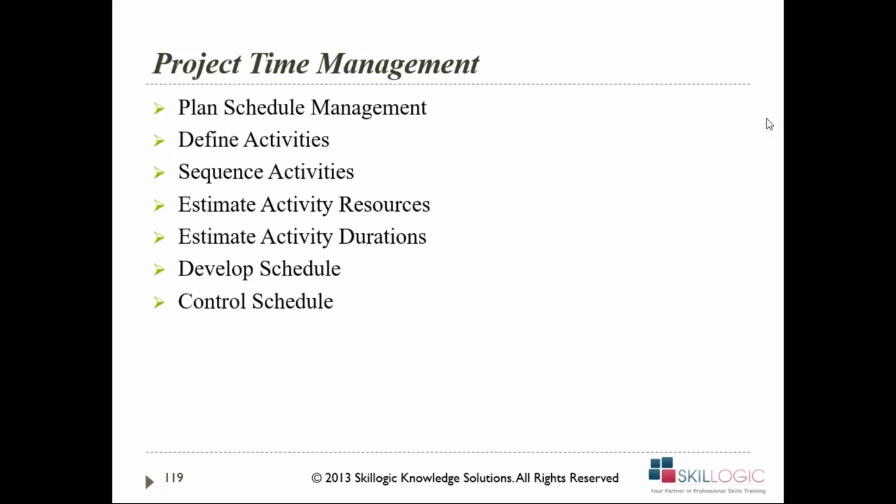Now, if it is mentioned and approved in my plan document that if the change impact is less than $5,000, the project manager has the right to approve it, the project manager can go ahead and directly approve or reject it. He can take a decision. Now, I'm not saying 5,000 is the threshold value. It depends upon you, your project board, and the comfort zone that they have. It could be just $1,000, $1, $0, 10,000, or $100,000. It depends. After the threshold, any change which is evaluated by the project manager goes to the project board.